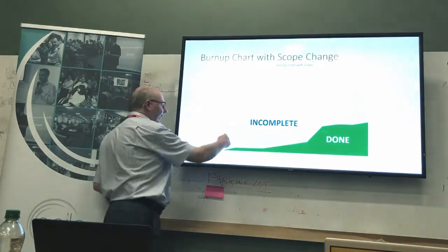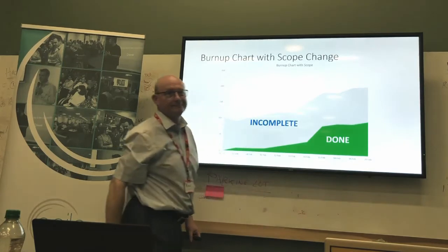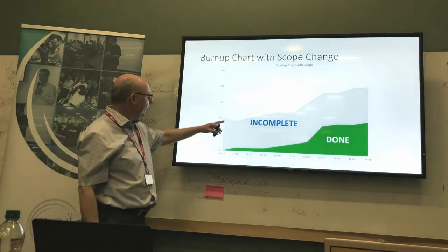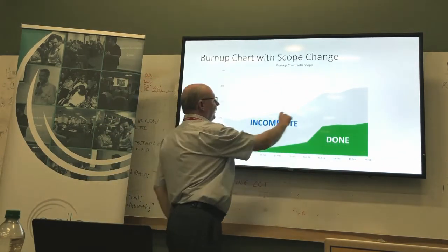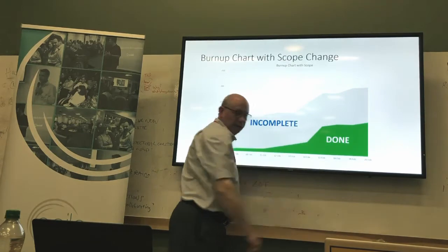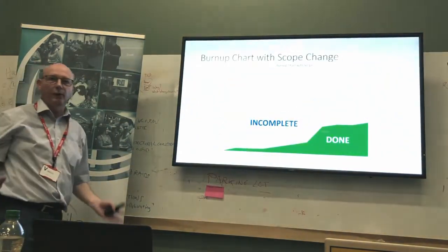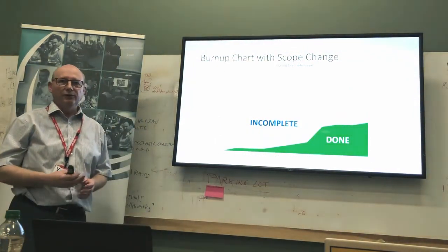How much of this actually is this? Now, I can tell you it's about half and half. Half of what we planned to do actually got done, and half of this other added stuff also got done in this sprint. Now, I'm afraid Cumulative Flow isn't going to tell you that, but Jira certainly does.